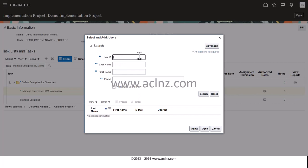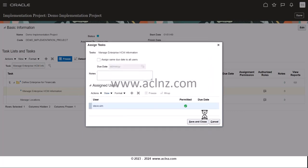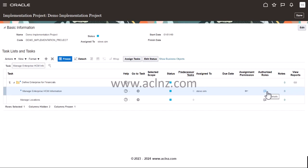I'm going to look for a username — 'Steve Sim' — then hit the Apply button, then the Done button, and then Save and Close. That's how you go about assigning the task to an individual implementation user, and this is how you have to do it for all remaining tasks. This step is somewhat optional — either you can assign to a specific person and give them authority to delegate, or you can leave it as is and assign as the implementation progresses, based on your project plan.